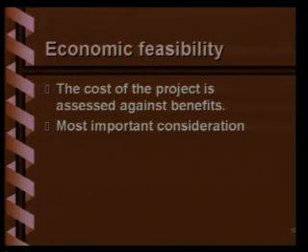Basically, operationally, whether a given system is feasible or not. Okay, but the most important of the feasibility stuff which you really have to do, once again we go through quickly, is the economic feasibility. Whether your project is economically viable, the cost benefit analysis, that is, the cost of the project is assessed against the benefits, and this is one of the most important conditions for determining the feasibility of any project.